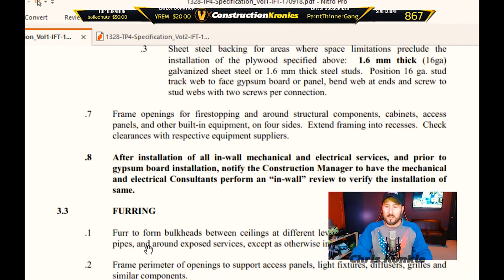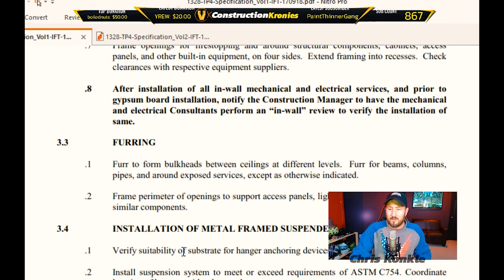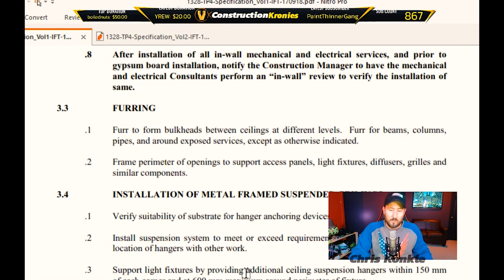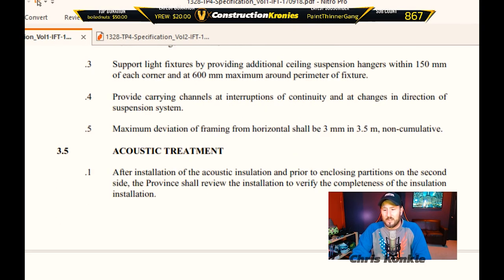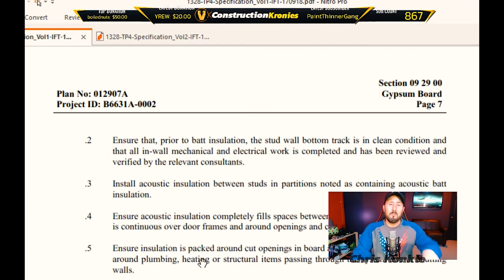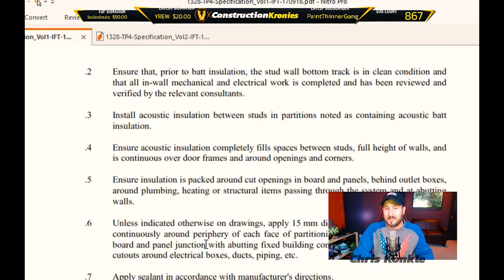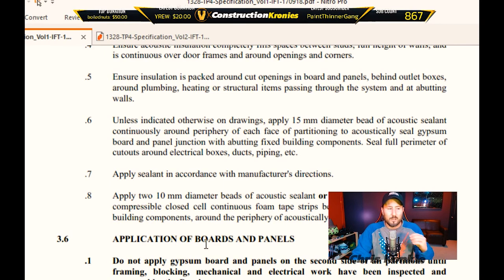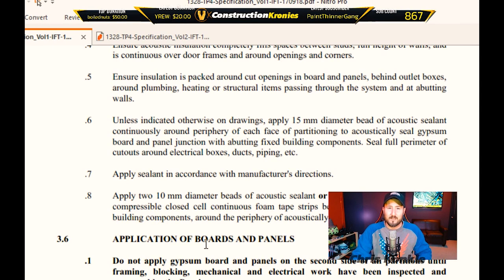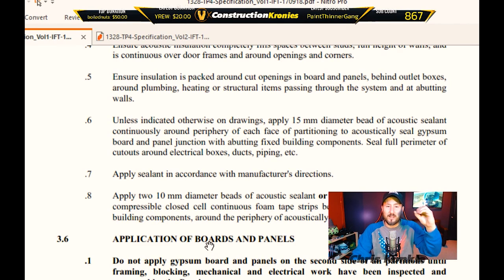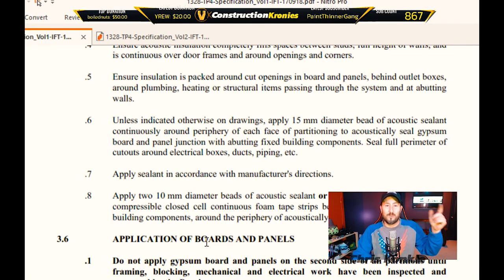It goes into furring, which a lot of drywallers will do, so check that out. Installation of metal-frame suspended ceilings covers how to support it. Acoustic treatment is covered as well — a lot of drywallers will do some caulking and things like that. It'll also tell you how to cut around penetrations — sometimes it'll give you an exact number for different types of pipes because they use inserts of different sizes. You've got to know what type of pipe it is and cut a quarter-inch, eighth-inch, half-inch, or one-inch gap as specified per pipe.